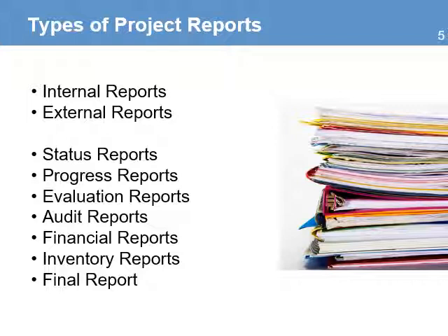Financial reports to update on the status of the use of the donor funds, which include financial analysis. These reports are usually made by the finance unit of the organization. Inventory reports on the status of materials and other goods stored in the project warehouse. At the end of the project, you will also need to develop the final report. This is submitted to the organization management and the donor to provide a summary of the project achievements and recommendations.